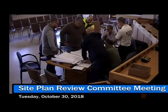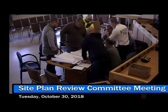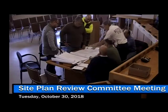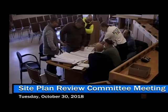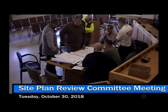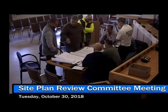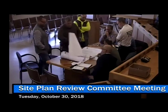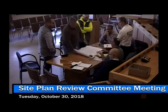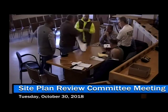Second floor, second entrance, come up the stairs, three-bedroom. What's the second address on the second floor? On the side. Right, the kitchen. All right, okay, thank you. I can't do a site plan review letter till it's uploaded, and I have a certified plot plan, okay? Thank you.